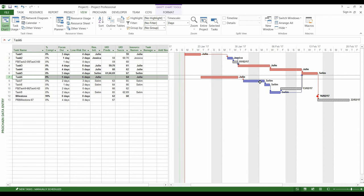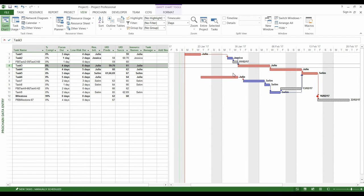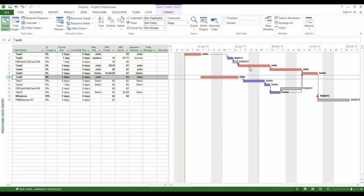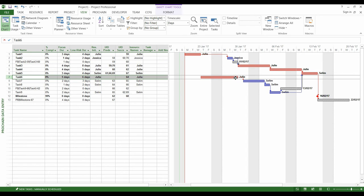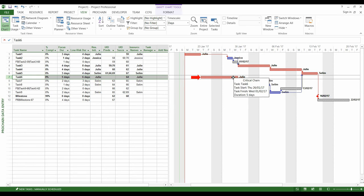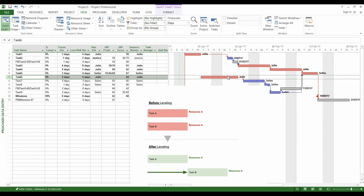We have this chain because Julie can't work at the same time on task number 1 and task number 6, nor will she work at the same time on task number 6 and task number 3. As a consequence, we postpone the tasks and create a sequence of tasks which takes into account the capacity of Julie, and that's what we call leveling.